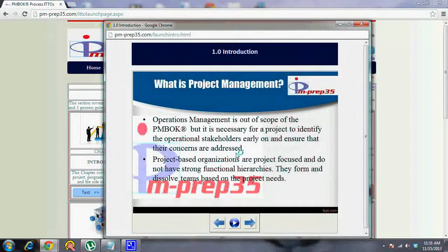We might have had this situation many times wherein we have to go and collect requirements, wherein we have to automate a particular system. So we might have to deal with people who have done the manual process. We would have to understand how they have done it and then factor in all their requirements. Although the drive comes from the senior management to automate a system, you normally will have to deal with the first level people who will be using it, and their buy-in is really important for the project to be successful. So that's where operational users become a key stakeholder. That's the right word, stakeholder, for your project success.